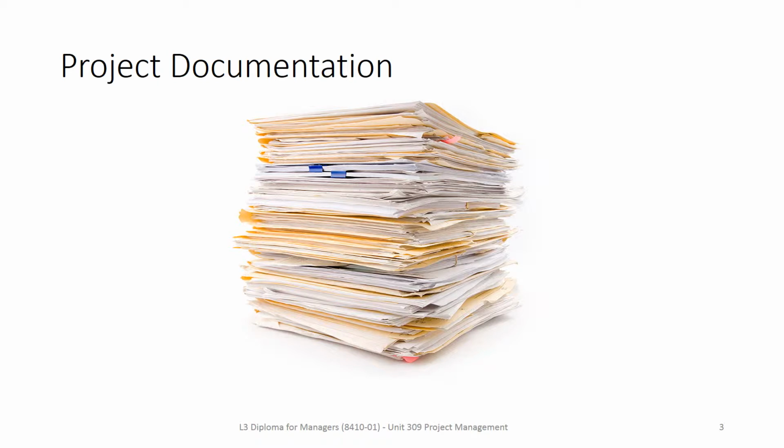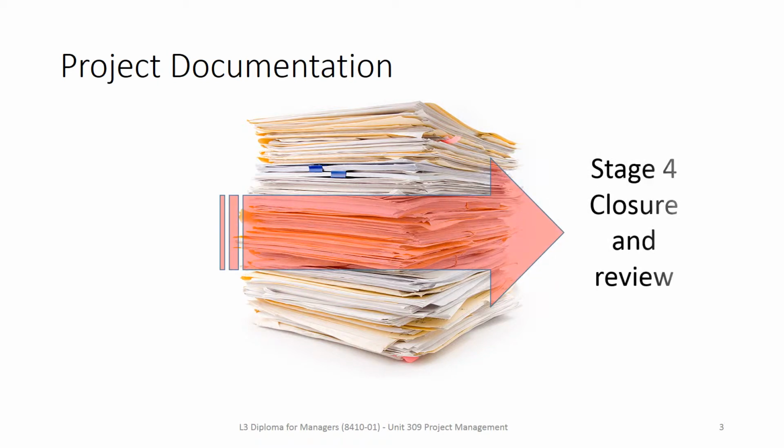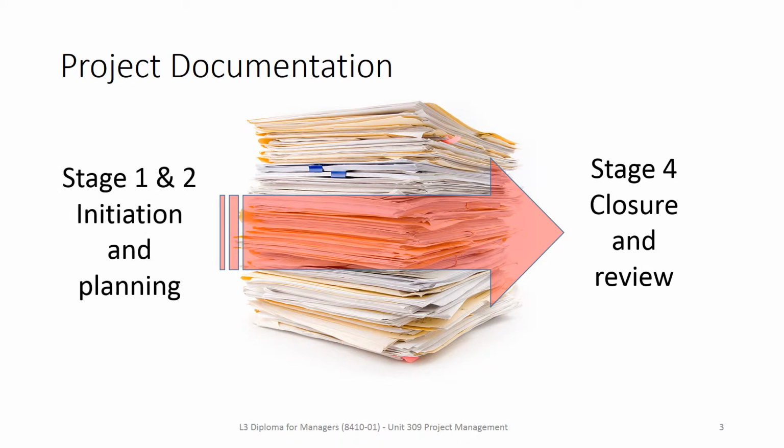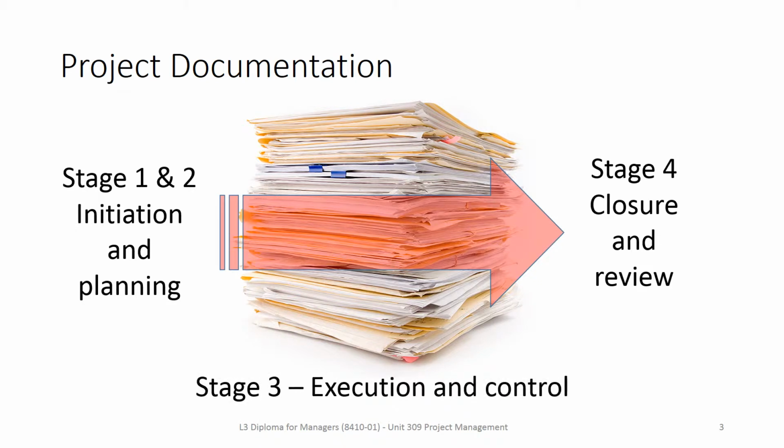Well, you need to consider the end of the project, really, to think about that. If we go to stage 4, to the closure and review, even though most of the documentation will be created in stage 2 in the planning, because when we get to stage 4, we're going to need that documentation, otherwise we'll have nothing to review. We'll need to know that it's met its outcome, its objectives, the goals, the deliverables, and they're all the things that we will have decided at the beginning. And then through stage 3, the execution and control, if anything's changed, if progress hasn't been where it's supposed to be, we'll need all that recorded so that we've got something to come back to at the end to do the review. So that's why the documentation is massively important.